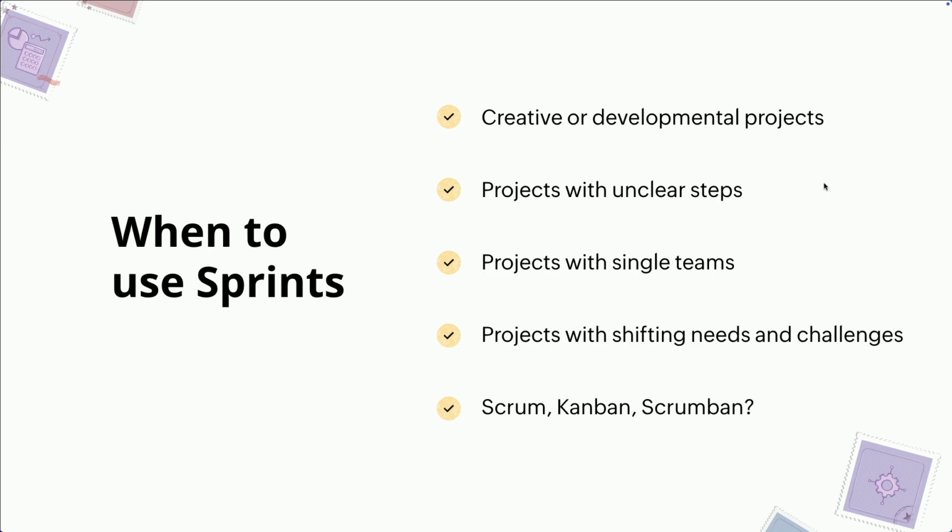For example, do we know what Scrum is? A Scrum just means a meeting. So Scrumming is a big part of Agile project management. It means you're going to meet constantly on these things. So every day, typically with Agile development, you have a meeting at the start of the day to discuss what blockers are, what you're going to complete. Because remember, you're on a set time schedule. You're trying to complete a sprint. 2 to 8 weeks, this all has to get done. You have to all get on the same page at the beginning of every day, and likely throughout the day as well. So typically, whenever someone uses this kind of thing, they are preferring to meet frequently.